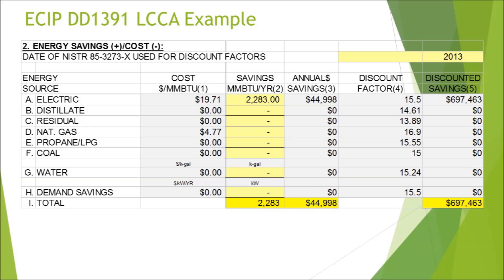The second area is energy savings. In this chiller replacement example, we calculated an MMVTU per year savings with a utility rate around $0.06 per kilowatt hour, producing an annual savings in dollars. When you import data into the PACS system — the DD-1391 processor the Army uses for submission — discount factors are automatically applied based on the latest NIST factors to produce a discounted savings figure. This energy savings value will be measured and verified under Tab F's M&V plan, so it's critical that it accurately reflects savings over current consumption.